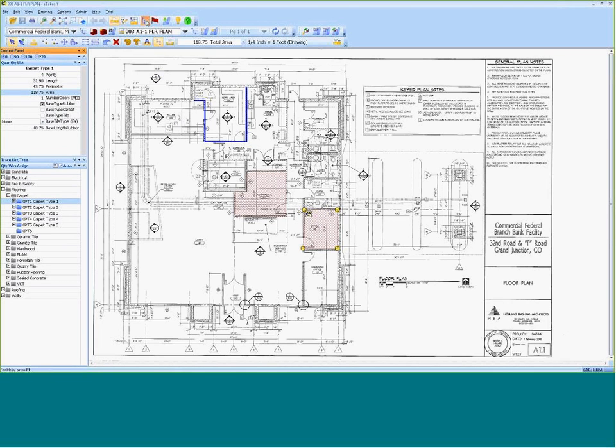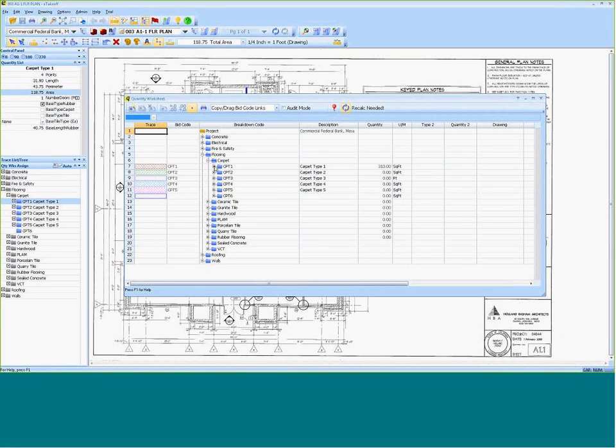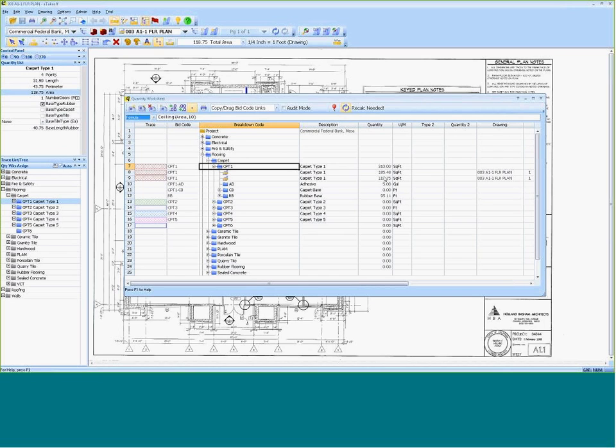So let's go to our worksheet and see our assembly that not the square feet, but it totaled both of those measurements, rounded it up to the nearest 10 square feet. It calculated gallons of adhesive based on a formula, and it popped in the rubber base total length of both of those measurements. And these can be extensive. You can do all sorts of stuff with these and build as many different assemblies as you want in here. So it's kind of a look at the assembly functionality.